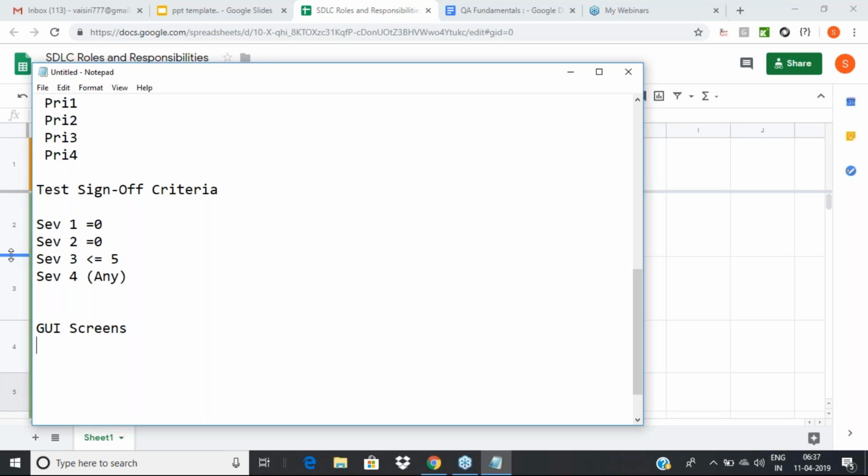And this prototype should not take too much time. It should be very quick, some 3 to 4 business days, or at most one sprint, which is like 2 weeks, where you do the development and your testing team will validate it, and then we'll go and demo it to the client.